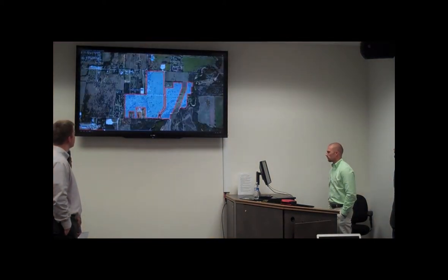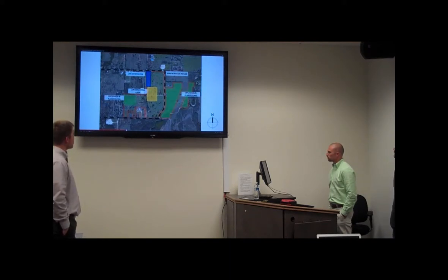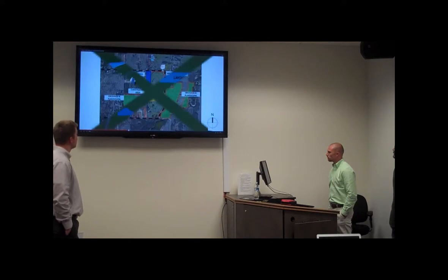Spread over 116 acres, existing roads allow easy and profitable site logistics for the construction execution. The existing structures on the north would serve as a material laydown area. By restricting the construction area to the central part of the site, close to the laydown area, easy circulation, speedy construction, and safety from the flood zones can be achieved. The west end would serve as orchards, and the east flood zone would serve as plantation area.